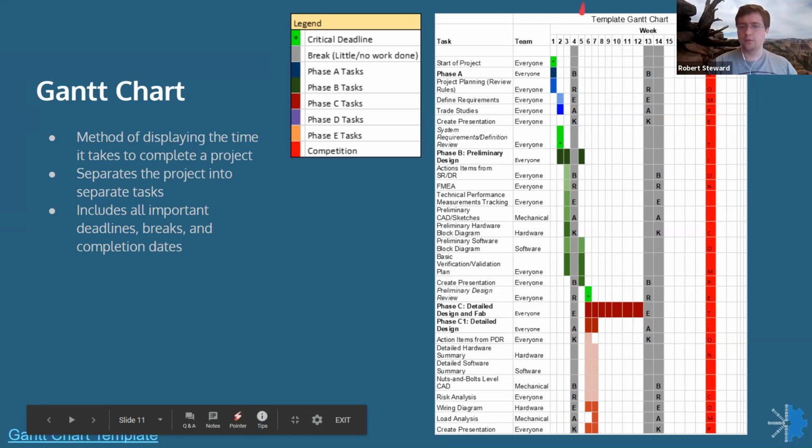But yeah, you have these due dates that you know that each of those due dates needs to be complete before you can start working on the next due date. And so you can essentially draw a line that goes along these to be able to actually reach your critical path along your project, which will really help you figure out how long the entire project will take. And this one, you'll also see that we broke it down into the different phases of the systems engineering process, which we talked about in a previous lecture as well.